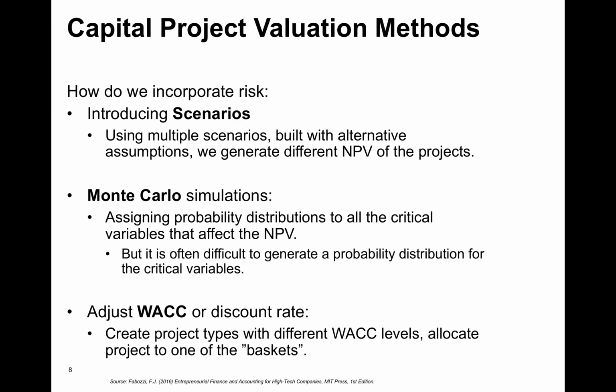So when we want to incorporate risk, what we do is that we try to understand which assumptions define each scenario, then we modify those assumptions, and we generate suitable scenarios. Those scenarios need to make sense. So for example, if the scenarios are built upon maybe population growth or income changes or temperature changes or climate changes, then when we put those different assumptions or variables together, they need to be likely. So my meaning here is that don't just randomize the combination of the variables. Try to also make sure that each scenario makes sense when the variables, the assumptions, are combined and put together.